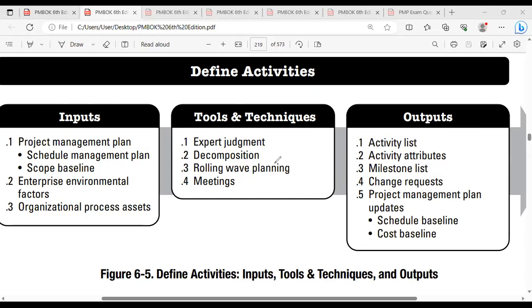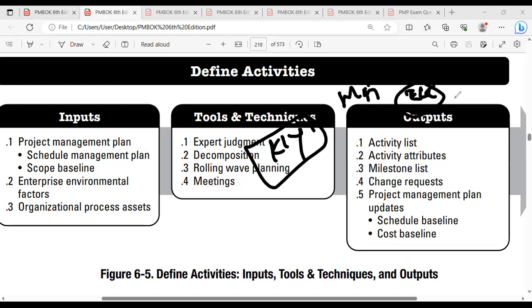For example, the task will be: lay 500 meter cable from one point to other point, from the North Pole to the South Pole. And you'll be giving the ID. Maybe KLA, KLY is used to mention the milestone. MAT will be for the material delivery, right? So you'll have your own ID for each and every task. Electrical will have its ID ELE, right? Mechanical task will have MEC. Civil will have CIB. So you will have the ID and the small scope of work will be described: lay 500 meter cable from the north side to the south side, right?